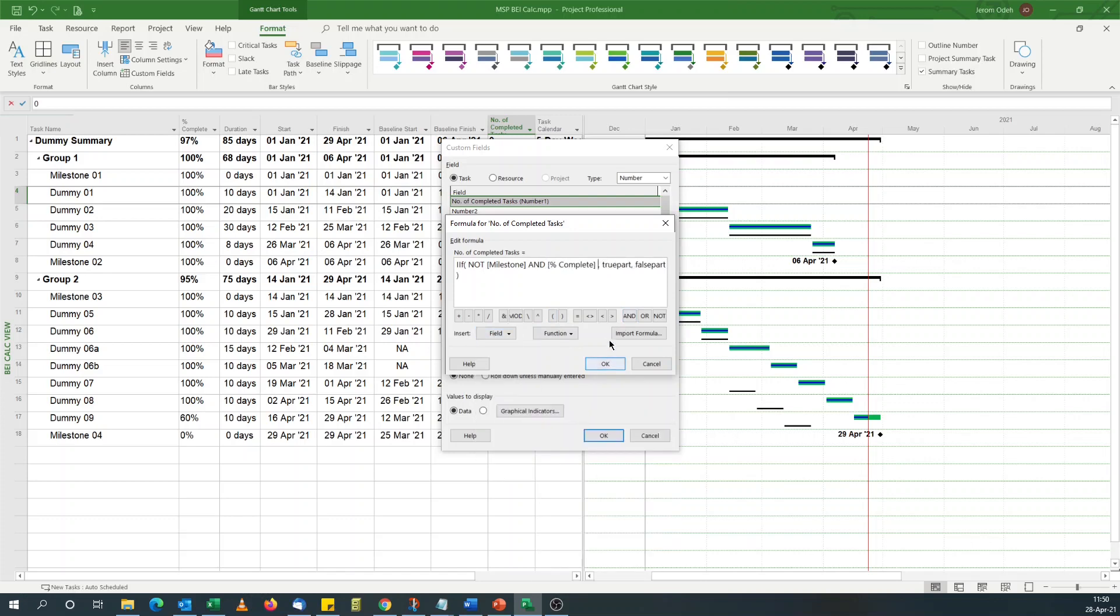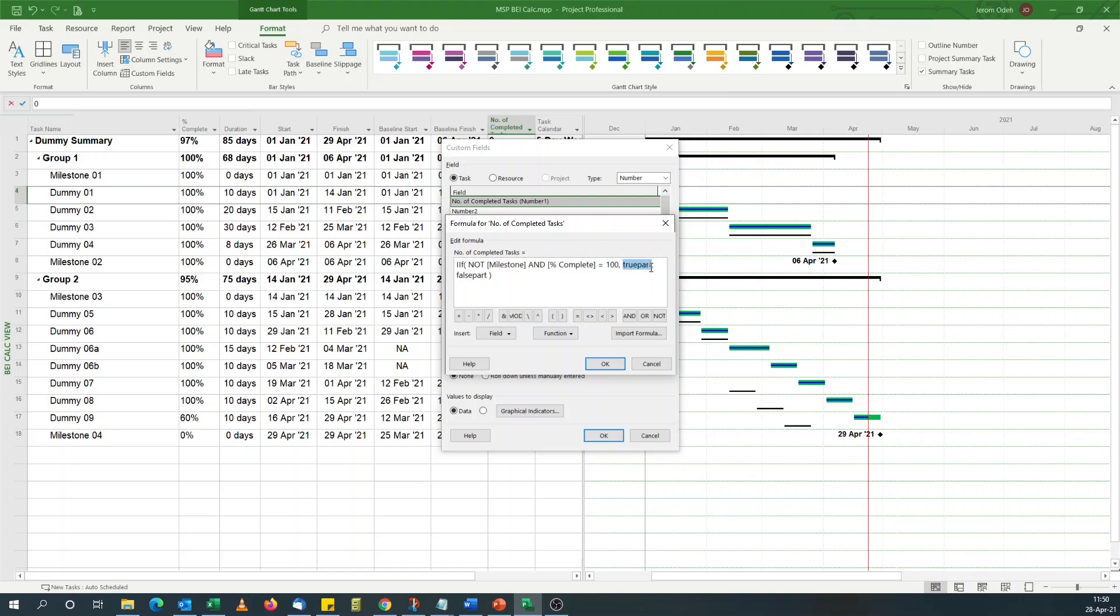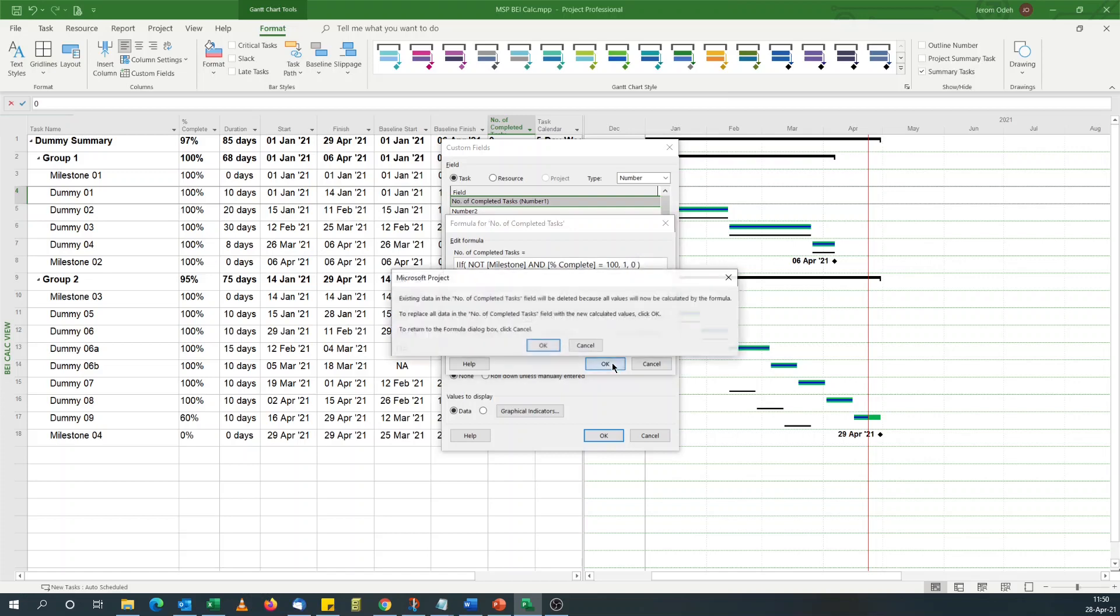Percent complete is equal to 100. What I'm saying is for each task that's not a milestone and it's completed, put one. If it's not completed or it's a milestone, just put zero there.